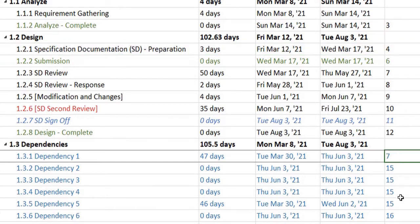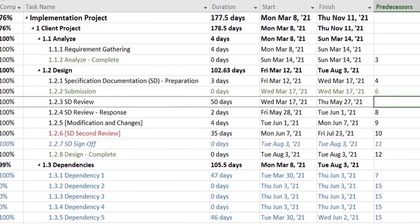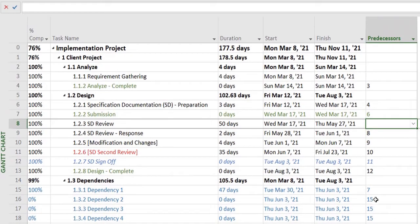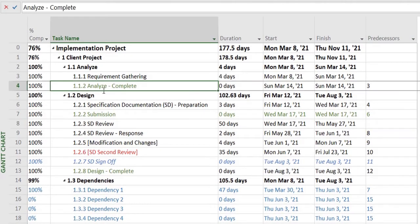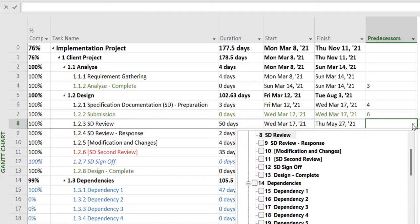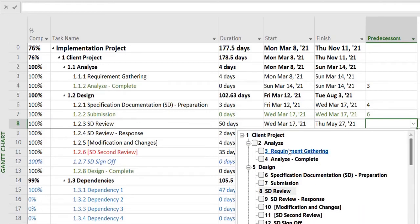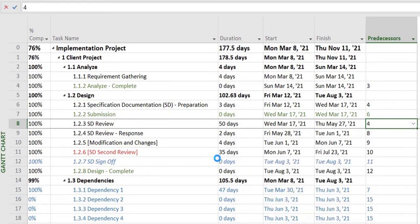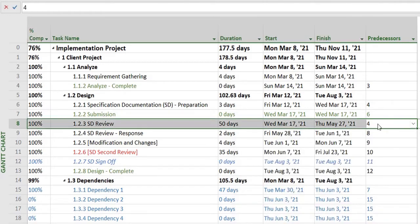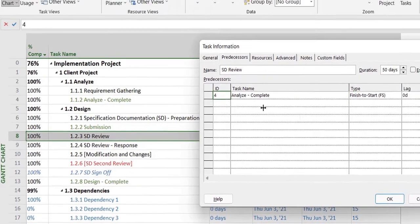For example, I want this particular task, task number 8, to be dependent on Analyze Complete. So what I'll do is an easier way is to select from here. If I select it from here, it will directly show and by default it will take or show you this as dependent on task ID 4.